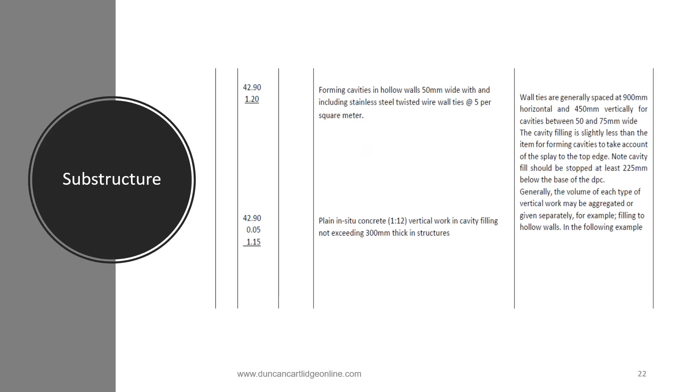This page contains yet another two items that can utilize the mean girth. Forming a cavity and building in wall ties is a measurable item as is the concrete cavity filling discussed earlier. Even though the concrete filling is only 50 millimeters thick, it has to be measured in cubic meters.